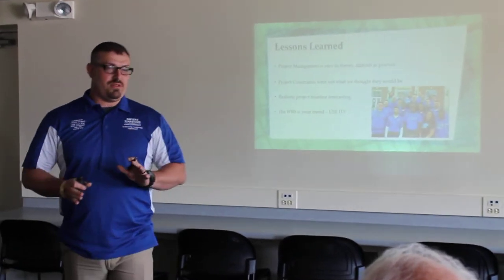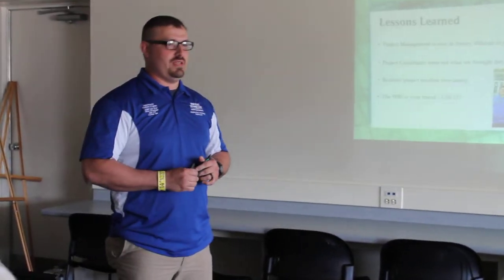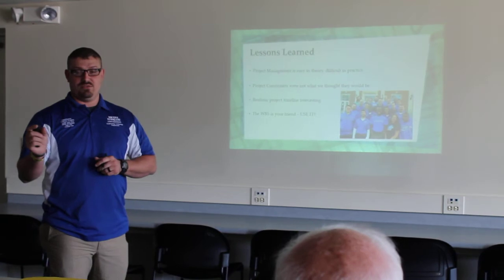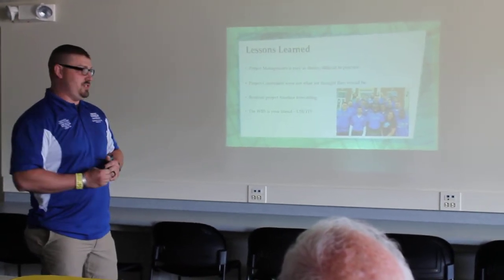Project constraints weren't where we thought they'd be. When we went into this as a brand new team, we thought that cost was going to be our biggest constraint. In reality, it turned out to be manpower. We originally did our project plan over the break between semesters, and guys were putting in tons and tons of hours. So we made a project plan and work breakdown structure thinking we were going to continue that rate of work, and then the semester hit and it all ground to a halt. So now we're a little more realistic on our timeline forecasting. We take into account the breaks, and then when we're during the semesters, we even adjust it for finals. And that's something we'll carry on into future years.